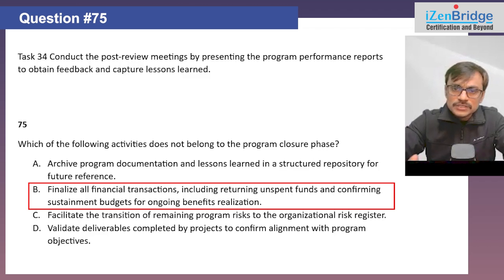So you need to conclude the financial transactions. You need to make sure that money which is not spent is returned, and you need to prepare a plan and a sustainment budget proposal for the ongoing benefits realization. So it's a part of your closure activity.